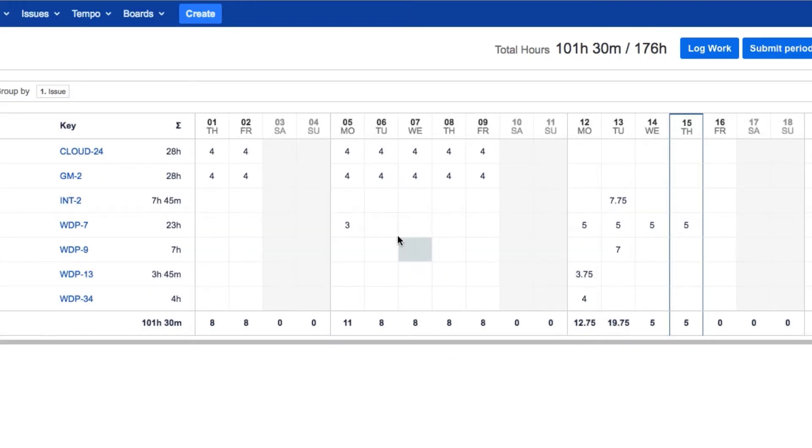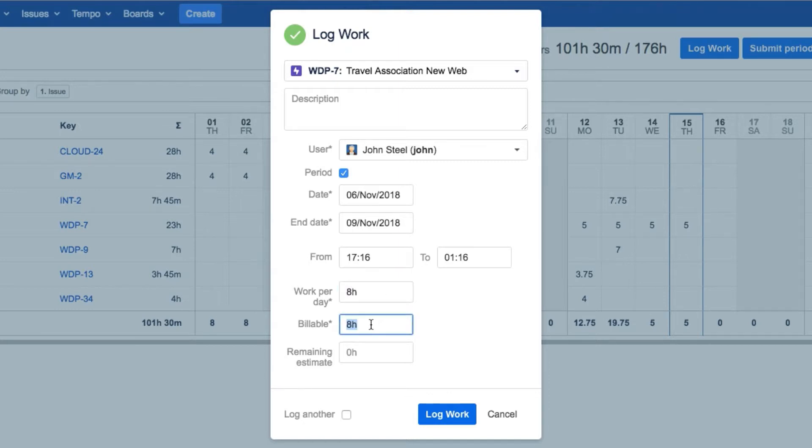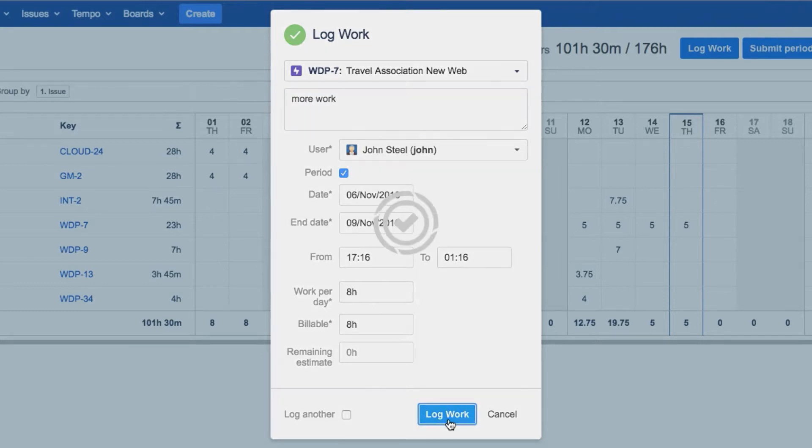And to log hours to the same issue over a number of days, just drag over a sequence of the cells. This adds the issue and the start and end date in the Log Work dialog, so you just have to enter the number of hours worked per day. And this is an easy way to log your vacation time or any other work where it's always the same number of hours per day for a period.